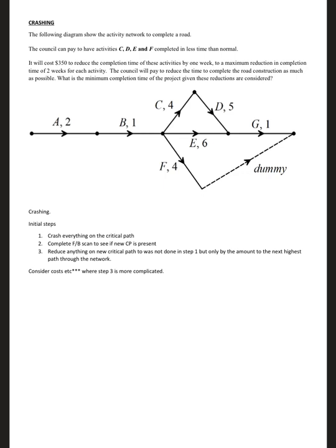It will probably cost you more money to hire those builders, but it could potentially reduce the time. So there's a payoff to the cost. But with crashing, they get more complicated because you might have other options that cost more money and this and that, so you have to consider all factors of crashing.